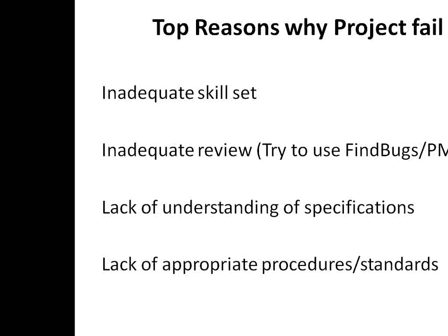So if you don't invest your time and energy, suppose I am a project manager, I will keep 5% for code review in my project management activity. In SDLC, 5% will be kept for code review. Why? If a code is not properly reviewed, it is a disaster. It will lead to failure.